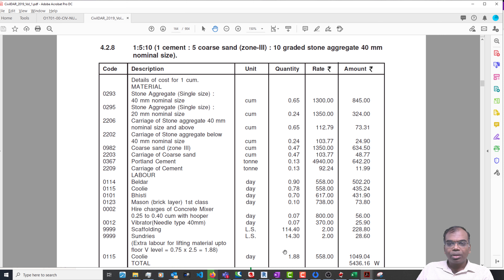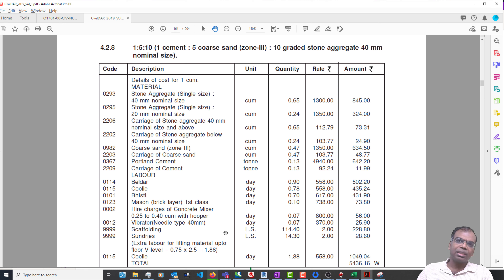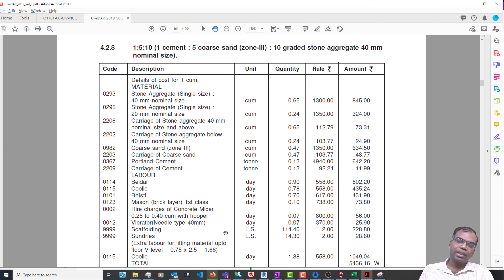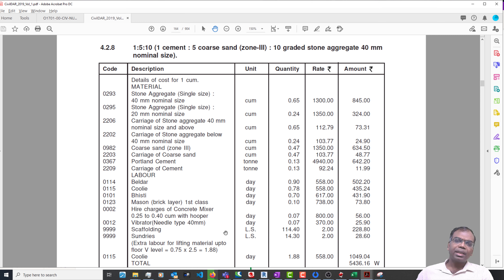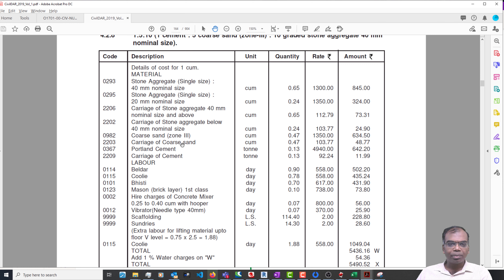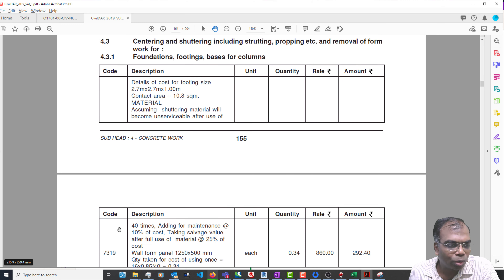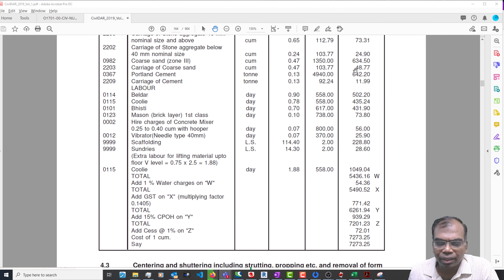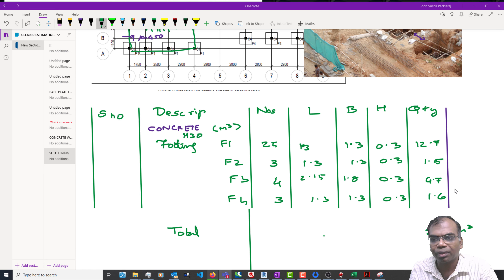Whenever you talk about masons and other laborers, it is a function of the organization. CPWD has assumed these values. If you are going to work for a contracting company, according to the technology the company has, you will find that the number of laborers increases or decreases depending on the technology available - whether you have a tower crane or something else. For example, vibrators will be there and probably a cement mixer somewhere. I hope all of you are familiar with this - it should be a reminder of what we have already done.